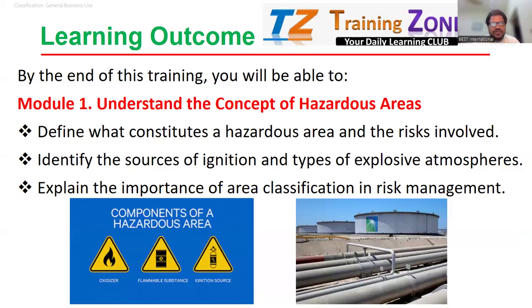Either we have a maintenance project or construction, or inspection, whatever the activity, sometimes a shutdown is there, overall preventive maintenance is going to happen. It's a long-term project. So in any shape, make sure we don't start our work until we get the permit from the client. Sometimes the client trusts you and makes you the issuer. Like in most of the Saudi Electricity projects, I noted the contractor project managers are the issuers, and the safety team are mostly the receivers, and sometimes the site supervisors are the permit receivers, whoever is there.